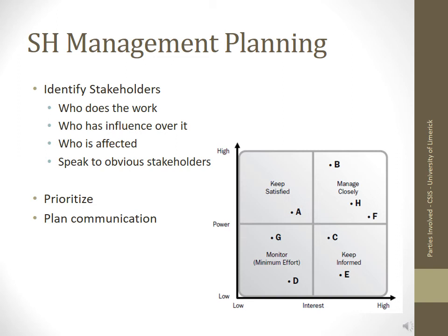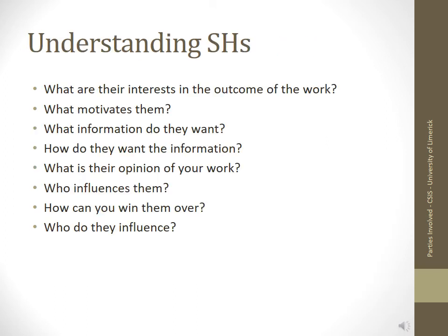Whereas the other end would be someone with very little power. Again, somebody like a supplier, for example, right? A supplier would generally not have a lot of power over your product development, because the worst they can do is not supply you with their services, but they wouldn't be able to cancel your project or something. And their interest is probably also, I don't know, it depends on where it is, but either you just monitor or you just keep them informed. Basically, based on that, you plan the communication and you plan how you are going to interact with them in requirements gathering.